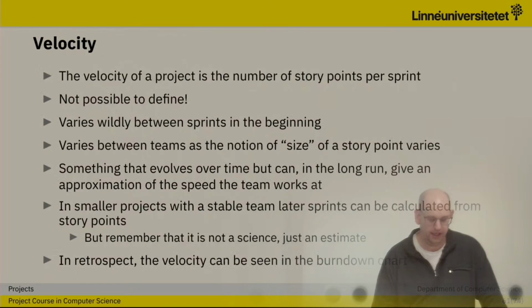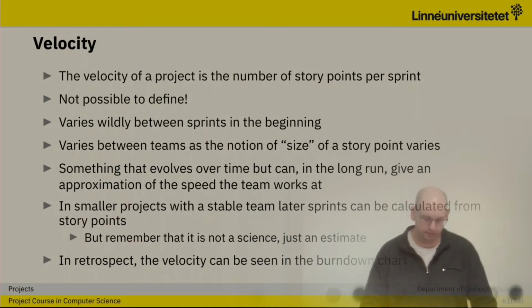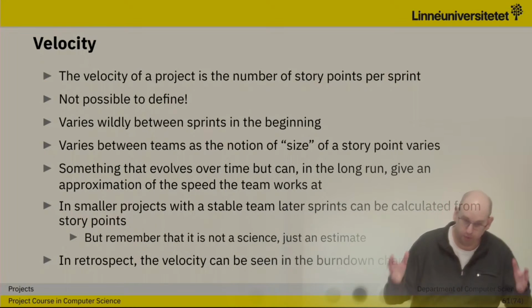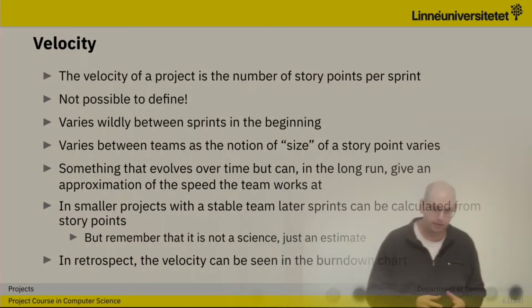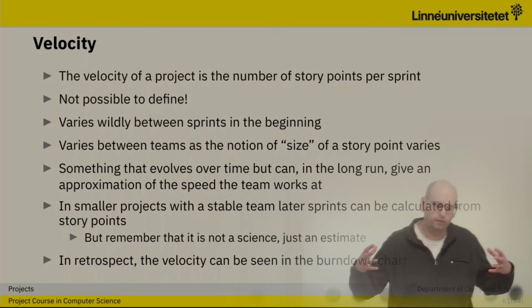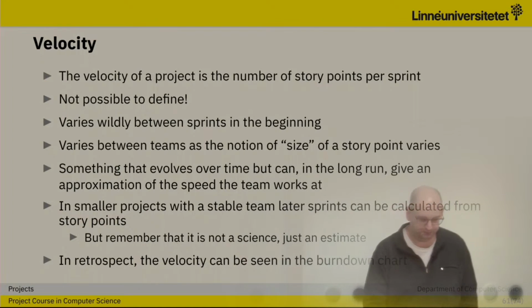Yeah. And as I said, velocity is about how many story points we can do in a sprint. And this is not possible to define. And it varies widely between both sprints and teams. So this is something that the people involved organically again get an experience and a knowledge about later on.